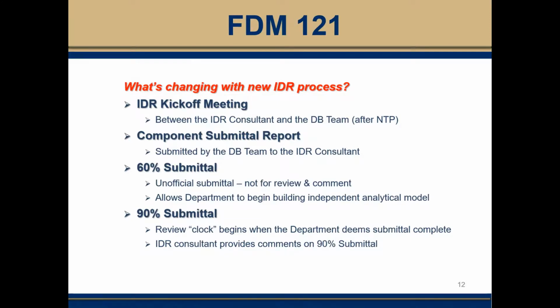A 60% submittal will be expected by the design build team to allow the department to begin building the independent analytical model. This is not an official submittal for review and comment, and the duration between the 60% and 90% submittals will be prescribed. Once the 90% submittal is provided, the review clock starts for the department and the IDR consultant officially kicks off their review. Comments will be provided by the IDR consultant at the conclusion of this review period.